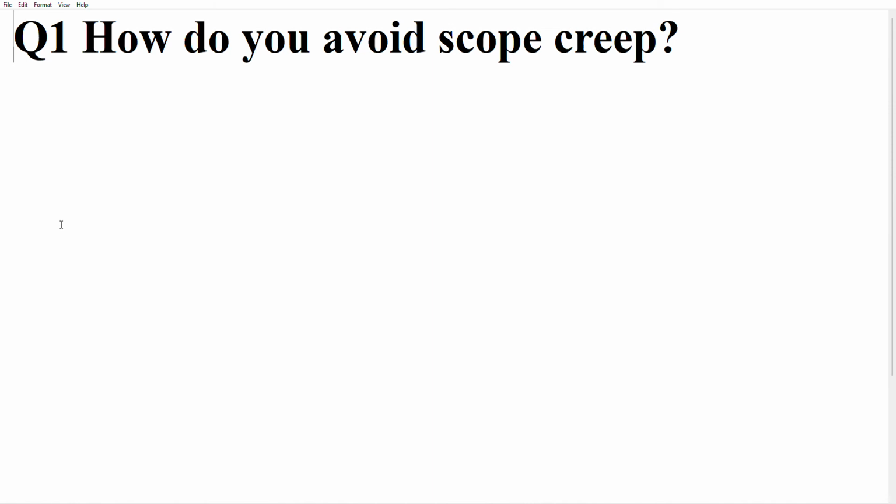But you do have to keep the capacity of the team in mind, the amount of story points, the amount of hours that the team works, and all that. You have to keep the capacity in mind, and you don't have to overcome it. If something is coming in that's more important, take out something that's less important and replace it with something that's more important. Sometimes it can be important to have scope creep, so keep that situation in mind.